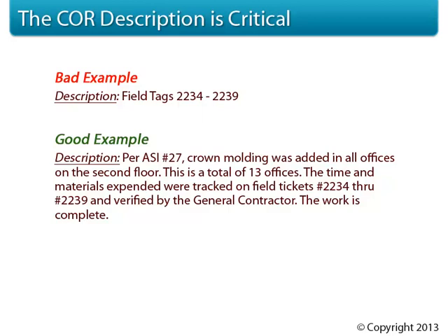It's a simple question, but as we discussed earlier, even a simple question could set the payment process back a month or more. Now, there will be cases when the work is not complete because the last portion needs to be completed at a later date, and that's okay. Just note it in the description, explain what is not complete and why it's not complete.